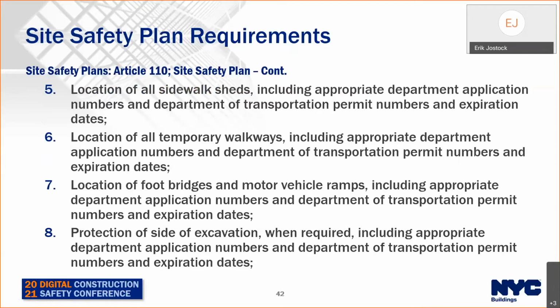Associated DOB permit numbers and DOT permit numbers. Locations of all temporary walkways. Location of all footbridges, motor ramps. Protection of side of excavation where required, including appropriate, again, department application permit numbers and DOT permit numbers.